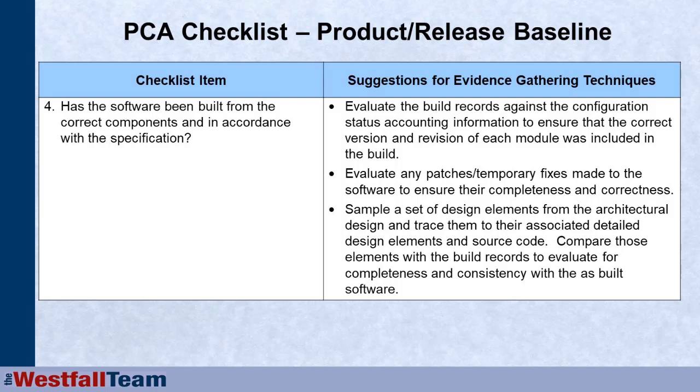You decided that all of these components were going to be in this product. Take a sampling of those and compare it with, again, the build records to make sure you've actually built all of those components into the actual build of the software.